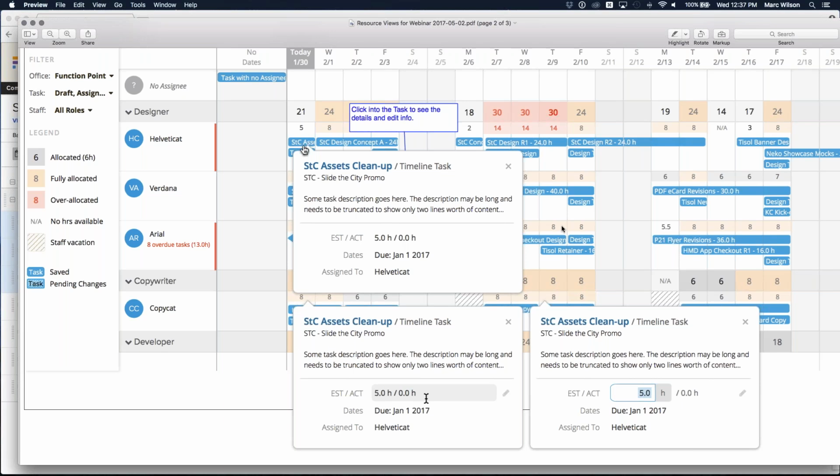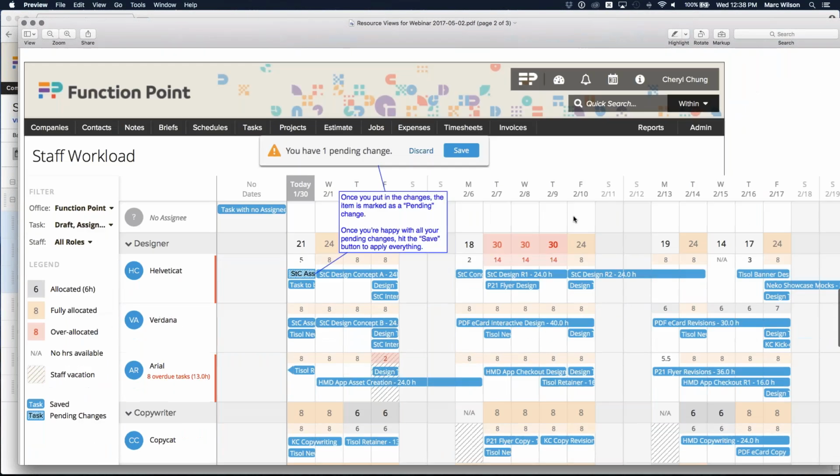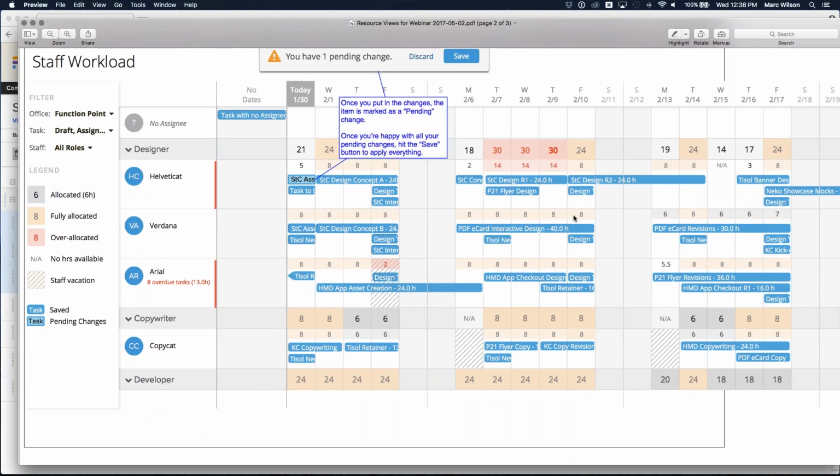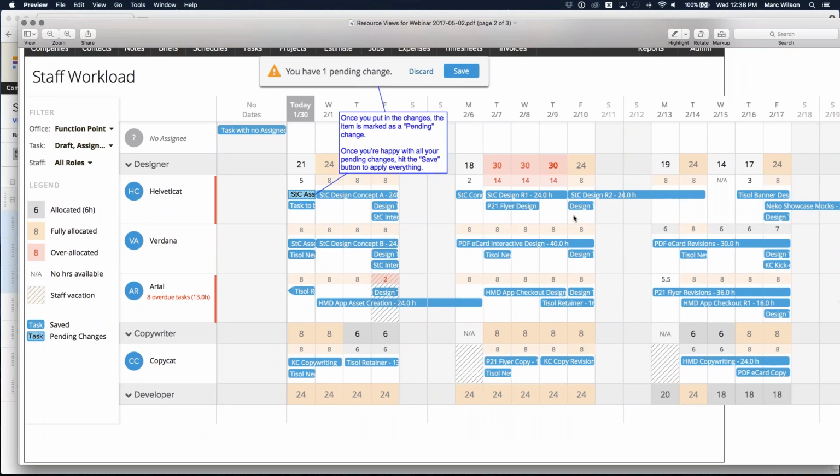Now, something that relates to that editing concept is the ability to preview what you're doing. Right now, if you make any edits on resource allocation, when you save that, it automatically adjusts everything. It adjusts the person's dashboard, it adjusts the schedule, their individual task details page. All those pages are adjusted right away.